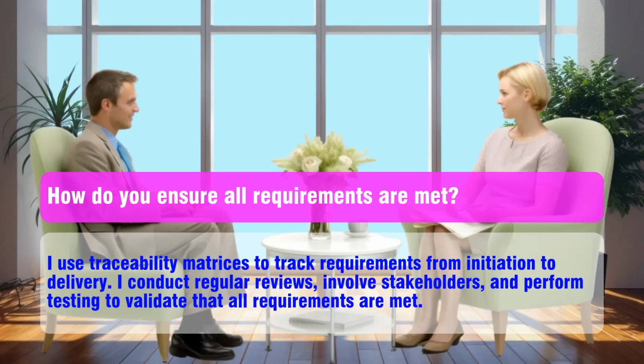How do you ensure all requirements are met? I use traceability matrices to track requirements from initiation to delivery. I conduct regular reviews, involve stakeholders, and perform testing to validate that all requirements are met.